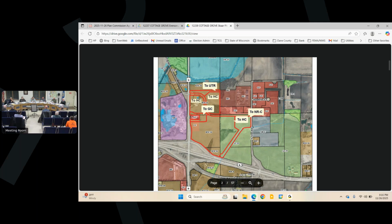And then do you have to have them as a signer on the plat, or do they have to give it over prior to? The northeast corner, that strip of land, the 33-foot strip you're referring to? Yeah, at 33, you've got an agreement? Yeah, I've talked to Paul again and Steve, they're all aboard. So we don't have anything in writing, but they're all aboard. You're gonna have them sign the plat then? Sign the plat or have a deed specific. Quit claim deed or something. Warranty deed for the town.